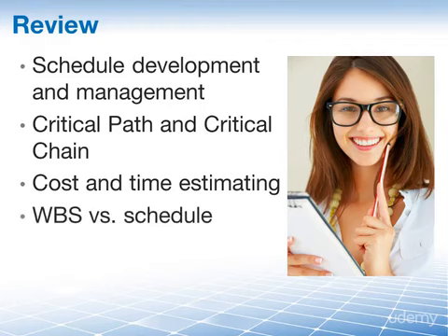We spoke about the differences between the work breakdown structure and the schedule. The work breakdown structure shows work packages, or rather components, in a hierarchical format, and at its lowest level, that's where the work packages are. And what does the schedule do? Well, the schedule shows the activities that are needed to deliver these work packages.